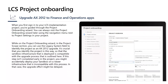The second step is LCS project onboarding. LCS is an administration portal and collaborative workspace to manage the entire project lifecycle. During the project onboarding wizard, in the project scope section, use the legacy system field to identify the project as an AX 2012 upgrade. This is crucial so that the sandbox infrastructure deployed is compatible with the upgrade process. If this isn't completed early, you might accidentally deploy your sandbox on new infrastructure using a different database pattern that is incompatible with the AX 2012 upgrade process, potentially delaying the upgrade effort.